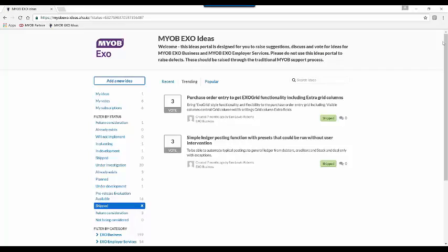So the quote lines are their own little entity in the database. They don't affect your stock, so you can put in whatever you need to put in there to help you report from what you think you're going to spend. Quite often when you start a project, you have an idea of the kind of money you think you're going to spend and make on that job. It's really, really hard often to quantify that after the job is done. So this is where you can actually use the budgeting aspect of the quote and budget tabs, not actually presenting a formal quote, although obviously you can, but you can also use it as a budgeting tool for your organisation. Quite often organisations will develop a significant...